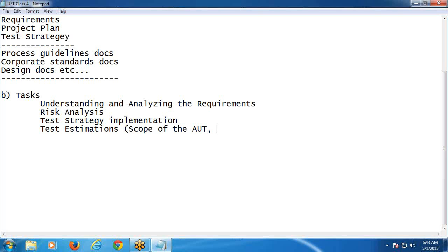Tools to be used. Here we are not discussing test automation. Software process, manual test process. Scope of the project is one considerable factor. Next, available resources, environmental and human resources. Next, time as per customer and budget. After considering all these factors, the test lead prepares test estimations. Next, after estimations, test plan documentation, and one more thing, team formation.